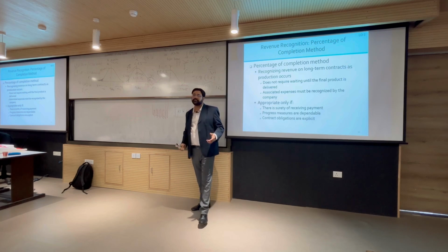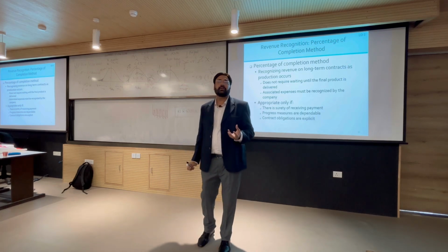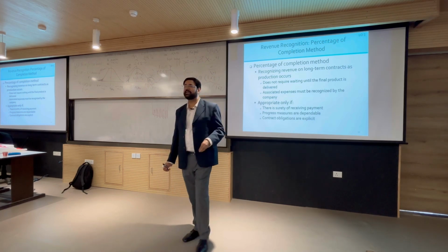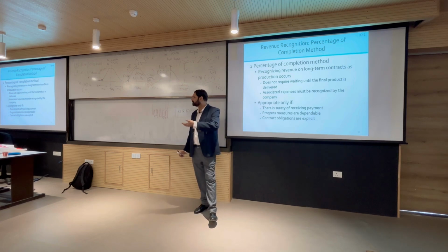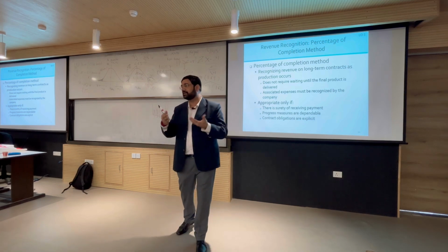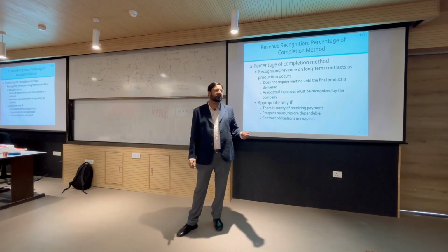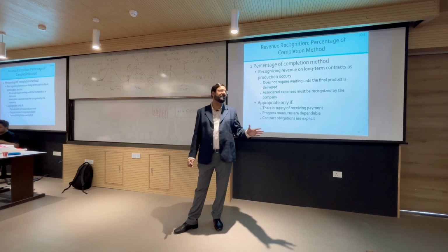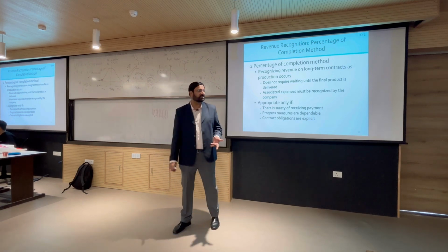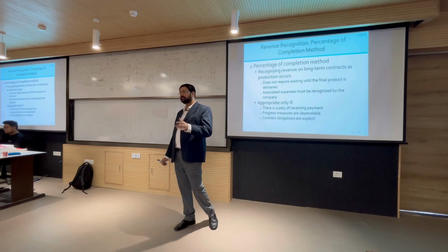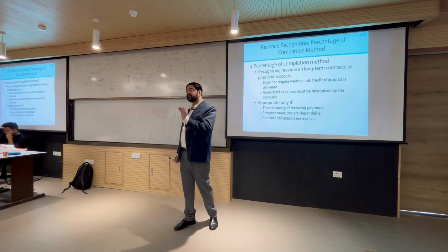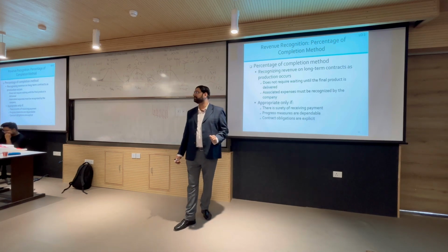What happens in real life, in construction contracts or in project business, is they come up with milestones. Usually they will say, okay, fine, we will pay 10% advance, to help you procure goods and services, because you have to set up a big team at any project site, so that requires cost. Then on completion of the first milestone, and there will be at least 5-6 milestones, we will pay you 20%. On completion of the second milestone, another 20%. Third milestone 10%, fourth milestone 10%, fifth milestone another 20 or 25%. And then they will still keep at least 5 to 10% for the end.